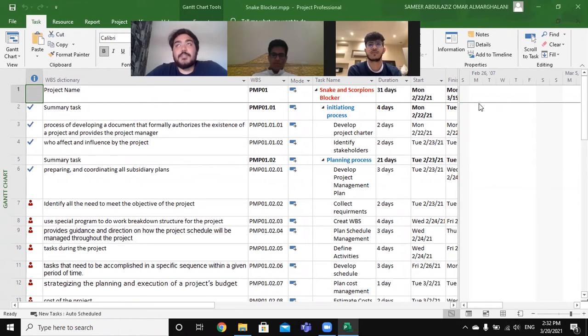The next feature in MS Project: resource definitions, people, equipment, and materials can be shared between projects using a shared resource pool. Each resource can have its own calendar, which defines what days and shifts the resource is available.